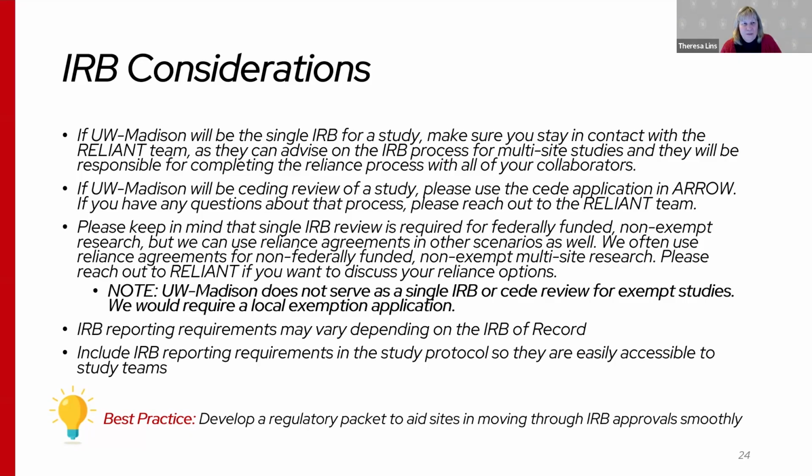I would say you would include it in the budget. So when I'm thinking about study startup, you still have to have prep meetings with the study staff long before you initiate the actual study and do the enrollment and recruitment. So I would say, yeah, you would include money in the budget for some of that staff time and such.